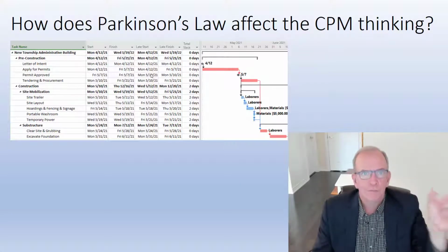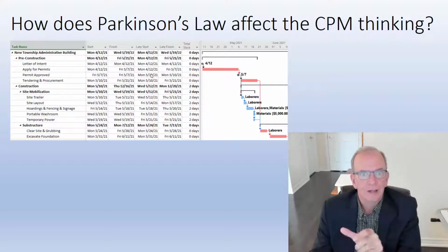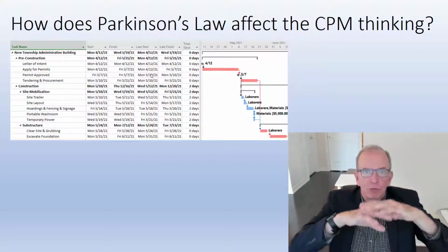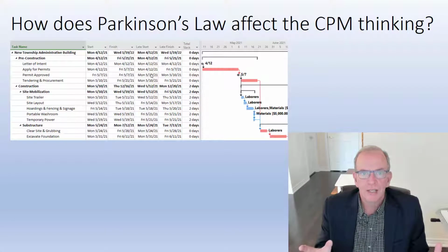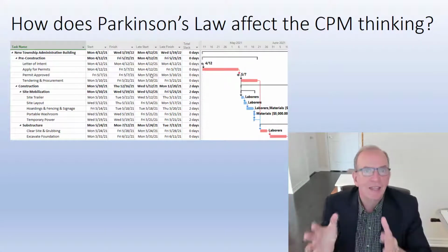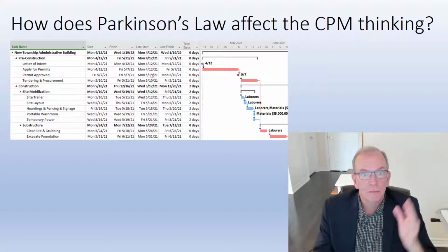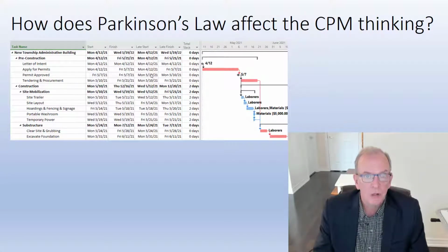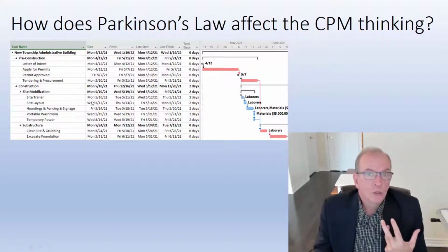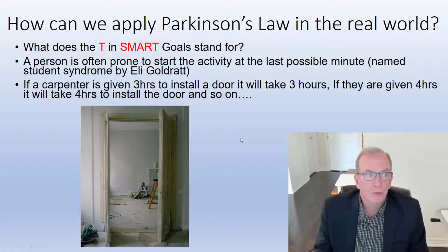Not only that, you've done that to a whole bunch of activities throughout your schedule, and it's really inflated the overall project schedule, and then people end up taking that time and you still have difficulty because of the ones that actually end up taking longer on those activities. So it's really a negative psychological thing we do to ourselves in project management when we pad activities and expect, well, we've given a little bit of leeway, so they should have plenty of time to get it done. And that's often counterintuitive to how people think.